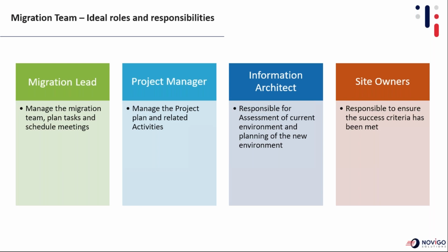Every migration team needs to have a migration lead or a team lead, and the migration lead is responsible for managing the migration team, planning the tasks, scheduling meetings, and leading the team. This migration is not just a SharePoint migration, it is also a migration of your users in the domain. You will also be involving different teams within your IT infrastructure: that would be network, your AD team, the Exchange Server team, etc., not just your SharePoint team. That's why we would also need a good project manager.